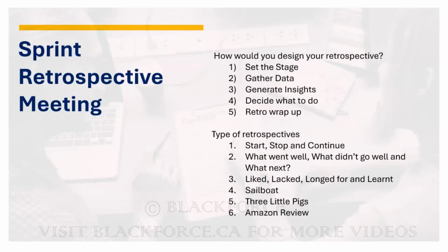There are even icebreakers on Mural that you can use as well, right? Just break the ice. So after that, the next thing you're going to do is gather data. How do you gather data, right? You are going to use one of these retrospective templates to gather data. When you finish gathering the data, the next thing you want to do is generate insight based on the data you've gathered, right?